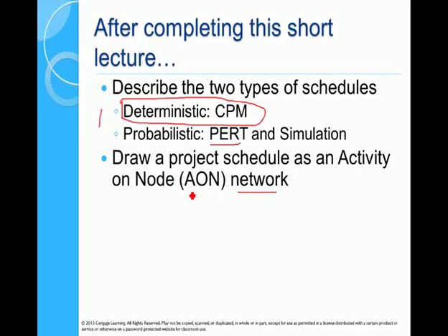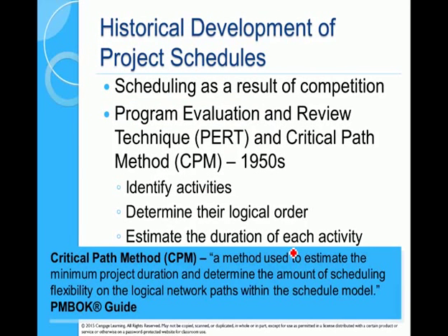Okay, and the one that we mostly use these days is called an activity on network, or activity on node, I'm sorry. Activity on node is the network diagram that is most favoured. There used to be something called an activity on arc. It's gone out of favour, and there's good reason for it going out of favour. So I'm not going to introduce that to you.